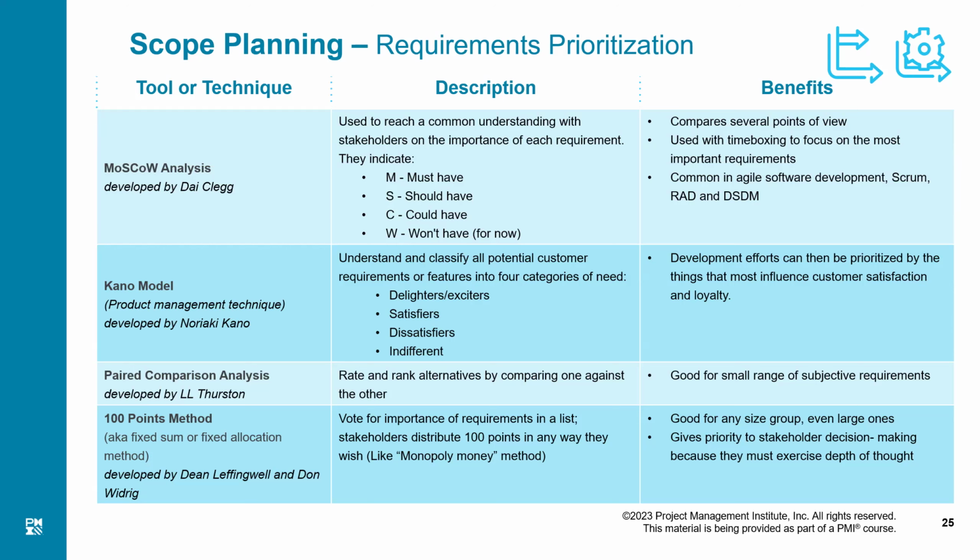Once they have been completed, we can consider the second highest priority, which is should have. If we are not left with any time and could only complete must have, that will give at least the highest level of satisfaction to the customer. So should have may or may not be done, but we would always prefer that during our project we complete all must have and all should have. But we can sacrifice a bit of should have in favor of must have.